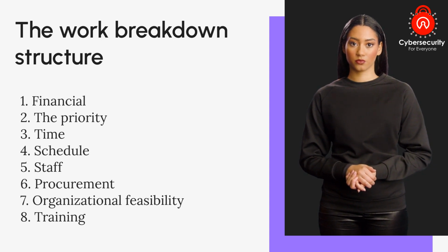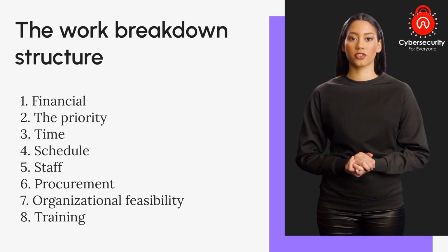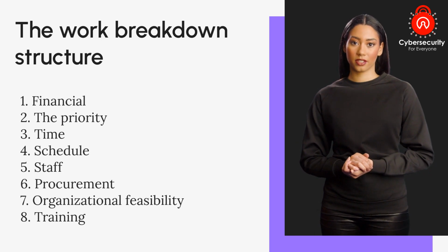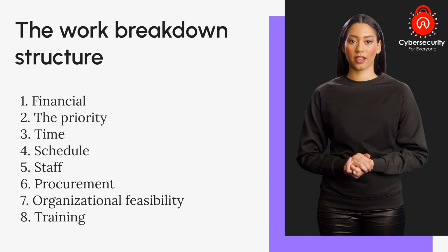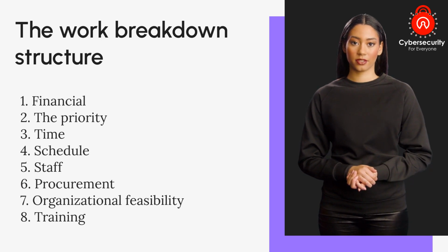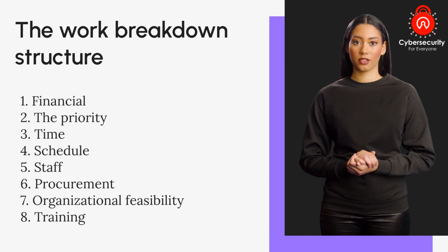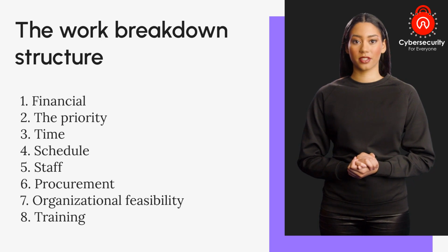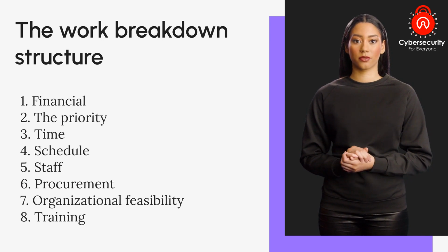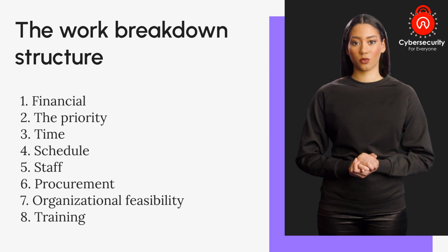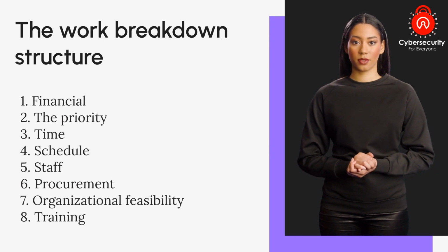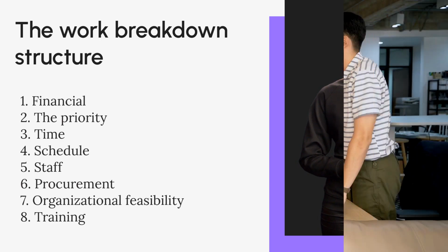Employees need training on new policies, and technology changes should be transparent to system users unless the new technology is intended to change a procedure. We should also factor in training and indoctrination considerations. The size of the organization and normal conduct of business may preclude a single large training program on new security procedures and technologies. Thus, the organization should conduct a phased-in or pilot approach to implementation.